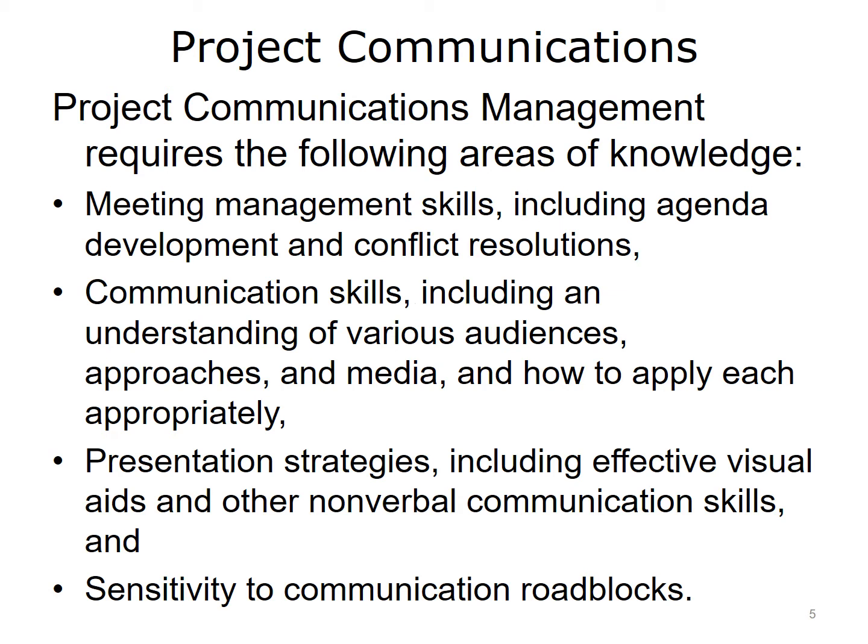Enabling good communication among the team members requires adequate forethought. The project manager needs to review all the available information to decide what stakeholders need to know to achieve their objectives, and then establish how often and through which channels that information should be disseminated. This communication system should include multiple media and must be open and flexible to allow changes and problem fixes to be implemented quickly. The manager can also track team performance by comparing status reports against performance predictions.